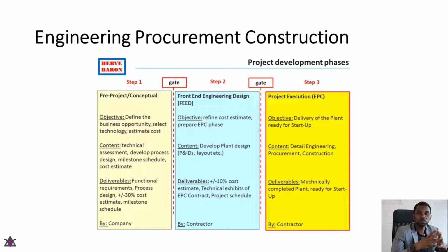So you can have up to, let's say, minus 30% to plus 50% in error. Although here they have placed 30%, there are some projects that can actually be 50% higher than what was estimated. So as stated before, for step 2, where they have more rigorous calculation, it is 10% plus or minus in error in estimating the cost.